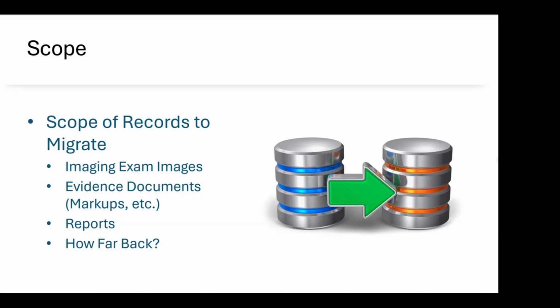So this is an issue where you have a PACS that has 25 years of images and reports, and an EMR that when it went live, they only imported 7 years worth of reports, and it's now 3 years later. So they have 10 years. So if you're going to decommission that PACS, in some cases, it's the only system that still has those reports. So you have to decide, are we going to do a report extraction from the legacy PACS system and into the new system?